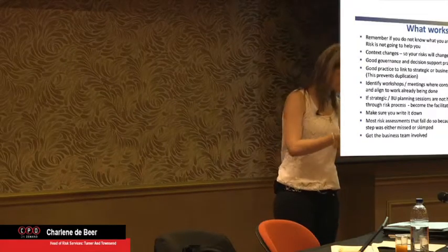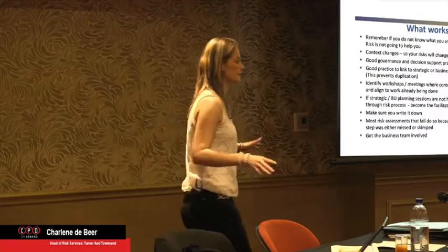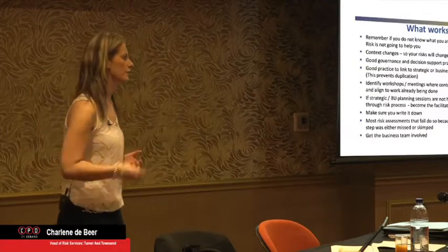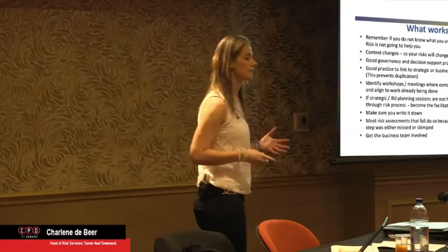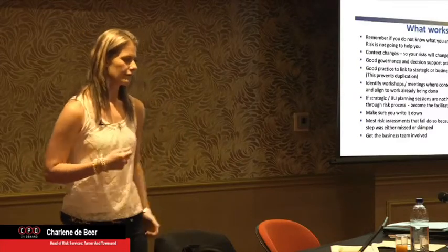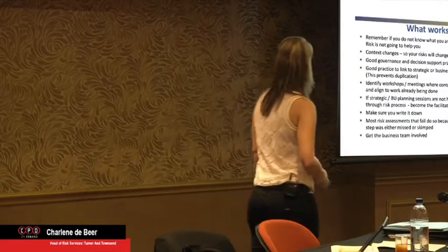They say, oh, gate review, okay, they've done these things, they're quite happy, they go. But then the risk register is never spoken of again, till about a year or a year and a half into the project, when we're behind on budget and behind on schedule. Oh, what risks are we facing? So keep it a live document, and make sure when you do the first assessment, it's an accurate assessment, so your contingency is accurate.